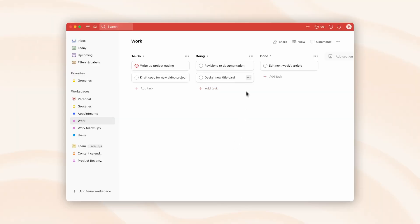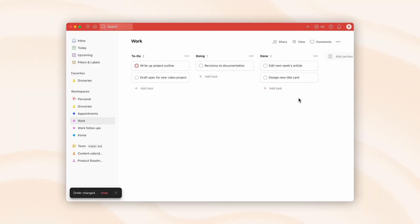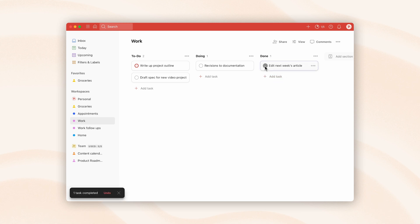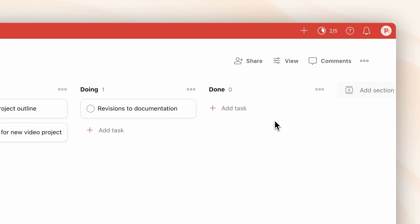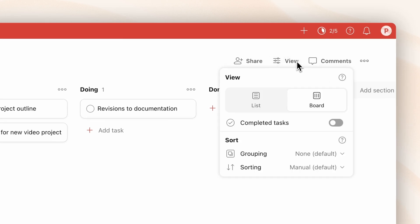Since Kanban boards are all about progressing everything in your lists from left to right, once you get to that far right column where something is deemed complete, you can either leave the card in that column or you can choose to complete it, which would make it disappear. There is also an option to have your completed tasks always toggled on — all you need to do is go to the view icon and select completed tasks.